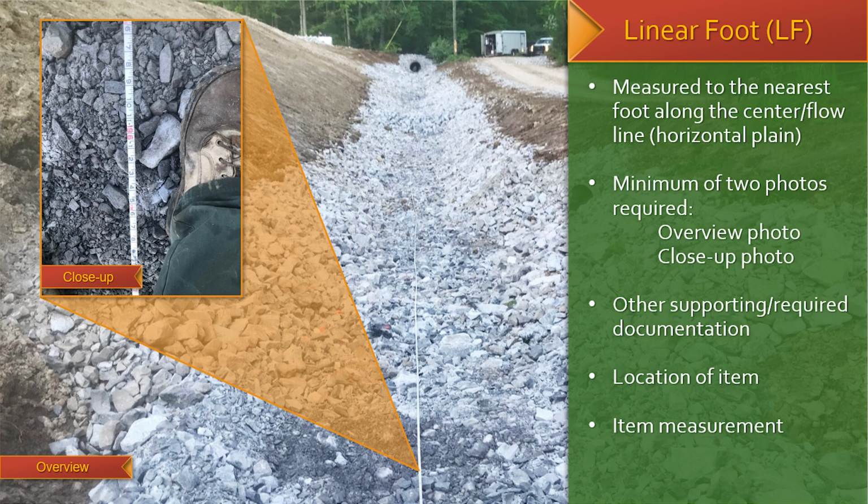All material slips, laboratory testing, or other documentation related to the item are compiled and labeled as described in the documentation module. The item measurements, location, and any other pertinent information are recorded in the daily inspection report.